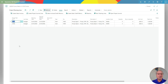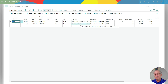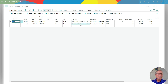These are the planning lines for this particular task. On this task I've got two assemblies. These assemblies are set up here — I'm going to have a Style 1 pump and a Style 2 pump. The Style 1 pump I'm going to assemble just as is, as I normally would do it, and the second one I'm going to customize. I've got a quantity of 5, and also the quantity to assemble of 5. Business Central is automatically going to create those assemblies so I can manage them from there.